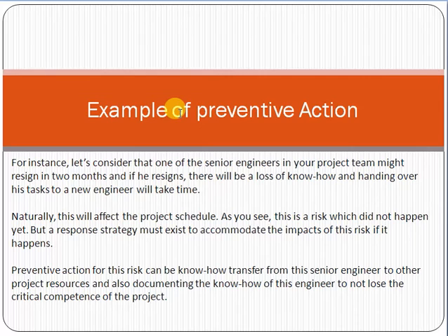So this is called proactive thinking. Once you push the vendor to provide the hardware 1 week before, you can meet the timeline. Because if the hardware arrives late, it will become an issue and you cannot meet the deadlines of the project. So remember, friend, one thing: preventive action means proactive thinking. Before any issue or problem occurs, you do the response planning and the response action, so that you can avoid the issue. So it is proactive thinking.